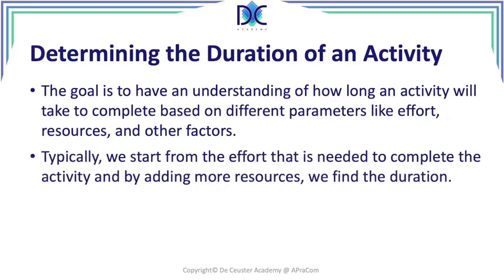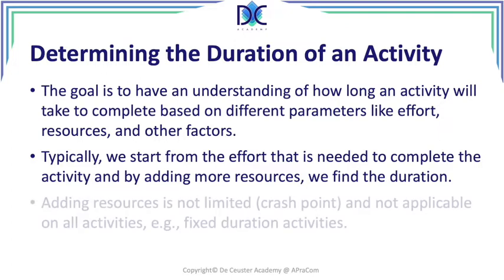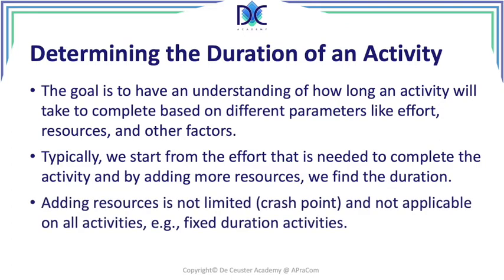Now we typically start from the effort and we add more resources, and when we add more resources we will find the duration of the activity. But be careful, we cannot keep on adding resources, it's limited, which we defined by the principle of the crash point. From some moment, adding more resources may lead to an increase of duration instead of a decrease.